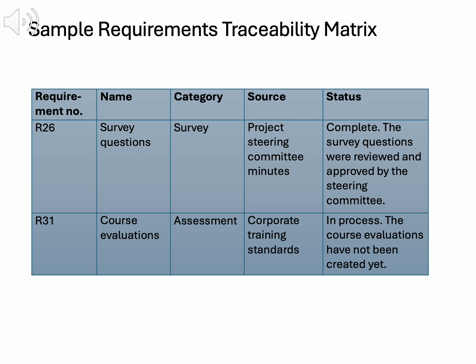The RTM's purpose is to link requirements to their sources, like stakeholder input or project documents, and deliverables, ensuring accountability. For the training project, it tracks needs from surveys to course delivery, verifying that each requirement is addressed. This prevents gaps, like missing a mandatory course feature, and supports validation by stakeholders.